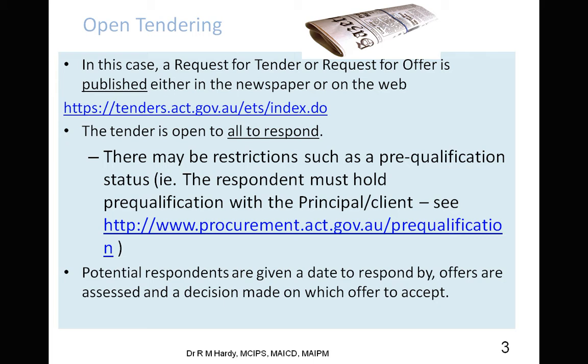Yeah, so in many cases, when you're dealing with domestic architecture, this is fairly clear. Like with my projects, I generally get 3 prices, and if I can get two of those prices to be within 5% of each other, then I know my documents are doing their work.